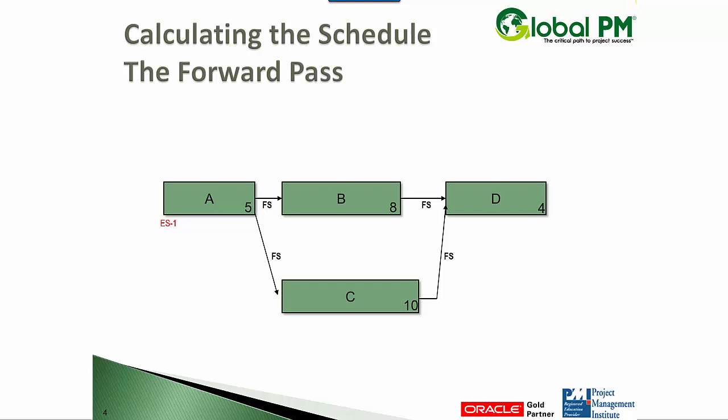ES stands for early start. It's day one. Let's call it Monday. So if that activity takes five days, and the durations are reflected in the bottom right-hand corner of each node, each activity, it starts on Monday. It takes five days. When does it finish? It finishes on day five, which is Friday.